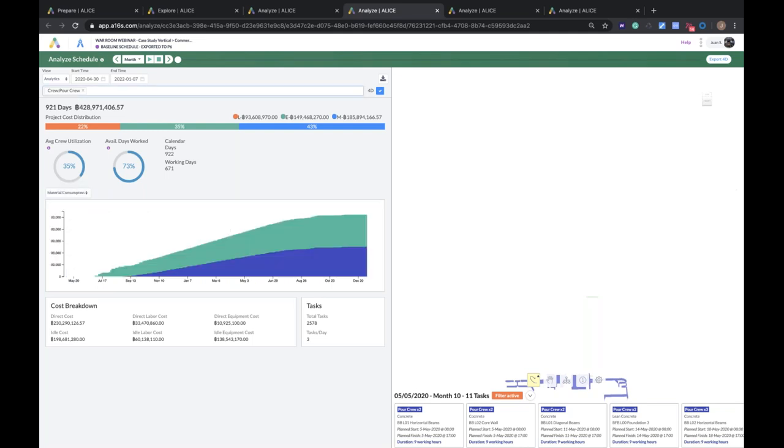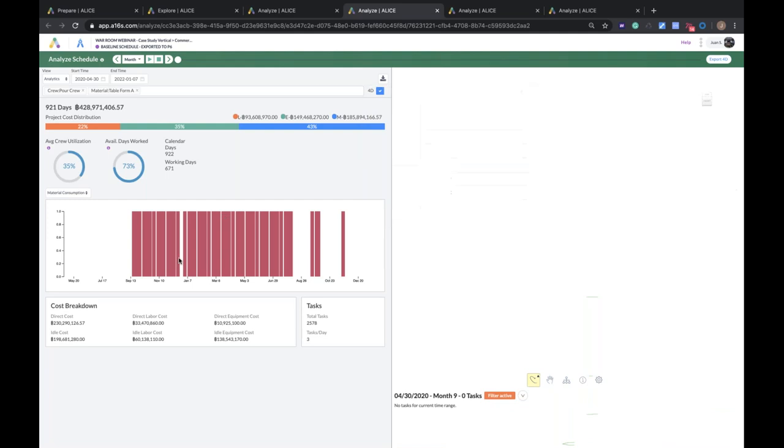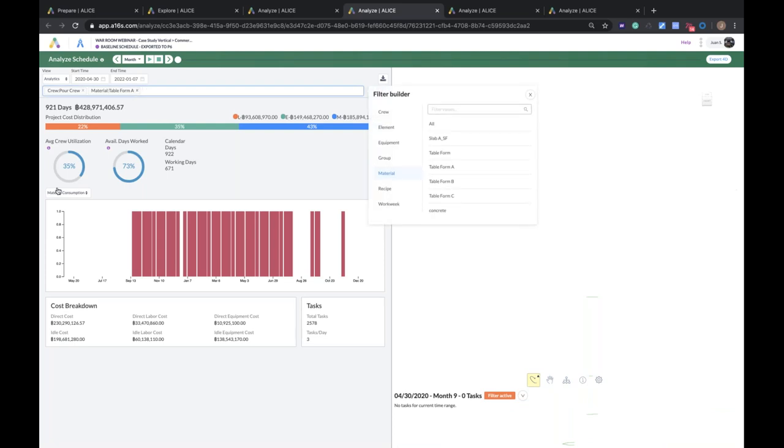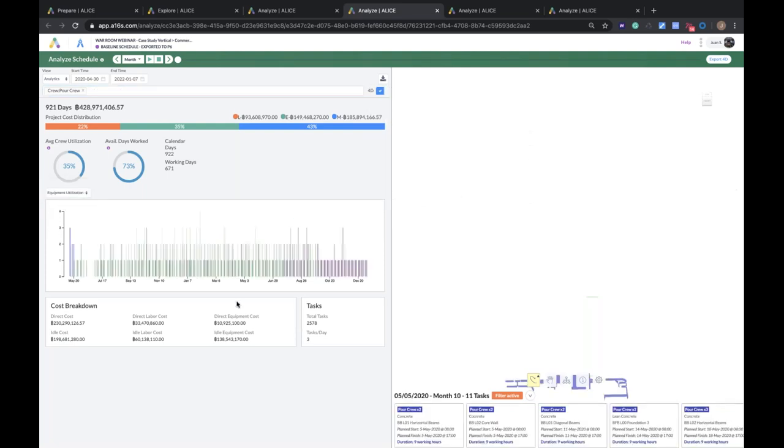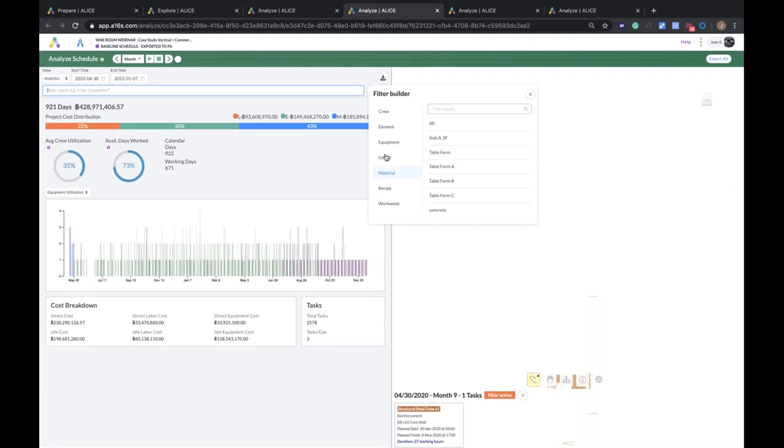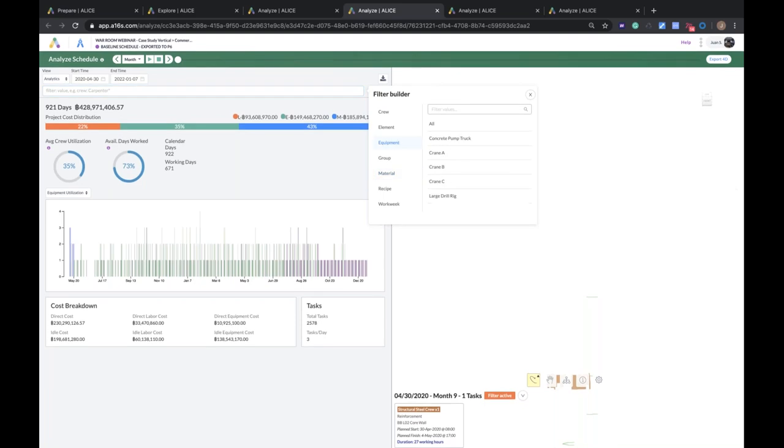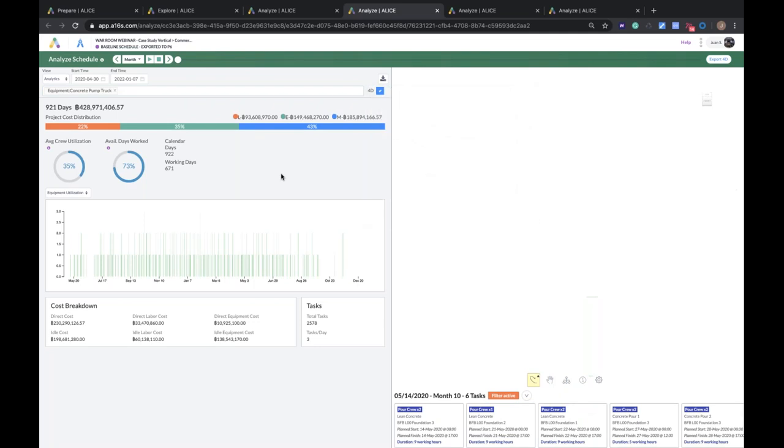I can also look at my crew utilization only for my pour crews. So let's go to today. Now I can see from looking at my pour crews that most of the time, we're using two crews, then we could jump up to four and six, and we peak out at eight crews. But we can run some schedules and identify, could we reduce the pour crews to six, seven, five, or four? And how is that going to impact their schedule performance and their activities on site? I can also look at my material consumption. So understanding what critical materials are being used, and at what time. This is especially important for formwork, where you can understand when your formwork is being utilized, and when it is being released.